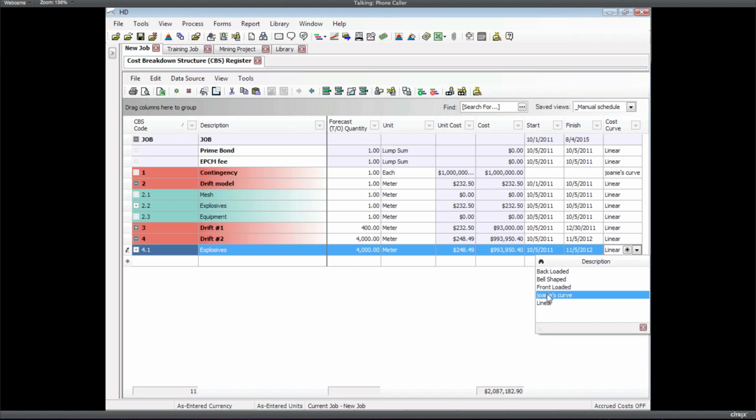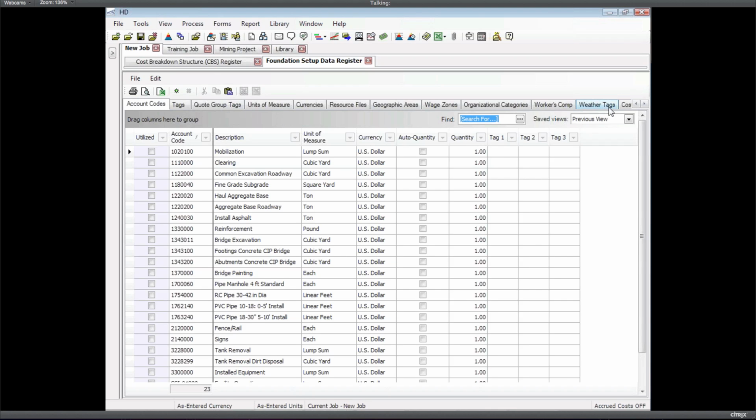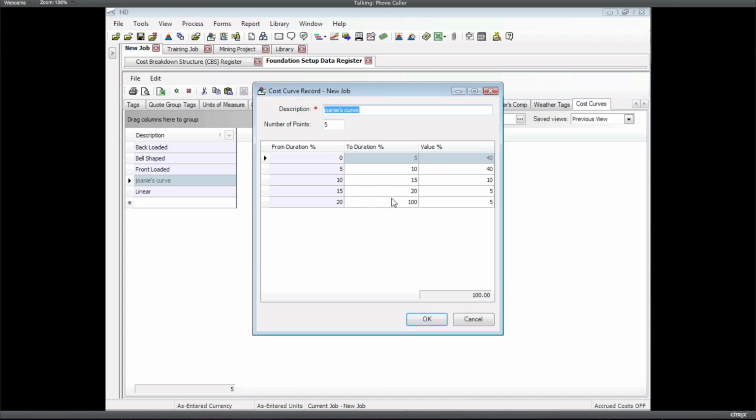And that's where there's some pretty complex math. If we go back to that curve we defined, remember, it had five buckets in it, right? So if we're going to spread that $990,000 across 13 months using this curve, you can imagine the math that goes on behind the scenes. What we're basically doing is fitting it into these buckets. We're taking that 13-month time frame, dividing it up into 5 buckets, and then proportioning it, right?